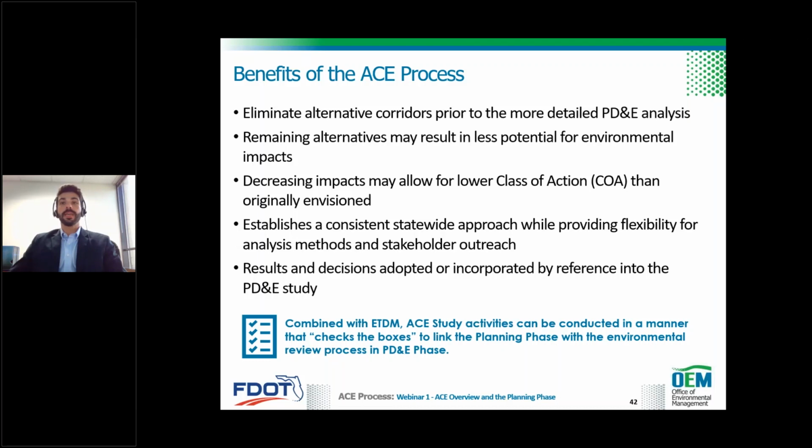The ACE process establishes a consistent statewide approach with enough flexibility to allow districts to tailor analysis methods and engagement efforts to the needs of the particular project. Early results and decisions adopted or incorporated by reference into the PD&E study help to shorten the overall project schedules, resulting in delivering transportation solutions to our communities in a shorter time frame.